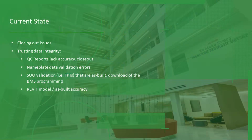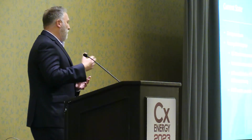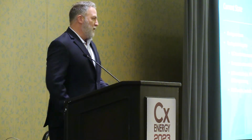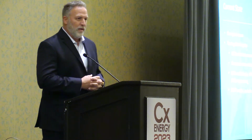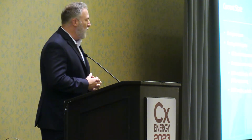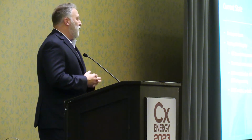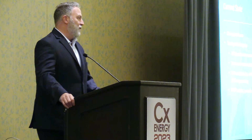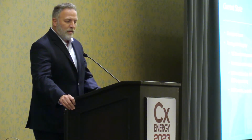So, focusing on current state: closing out issues during construction, prior to operations and handover, has always been a problem in our industry. Owners and end users need to take over these facilities right away so they can start populating their manufacturing process, their MRI spaces, getting patients into their rooms and focusing on patient care. Or students, right? You're doing this over a spring break or summer break. You can't be going back in under a MOP, method of procedure, to close out issues and continuously focus on activities that should have been done during construction.